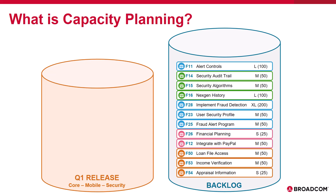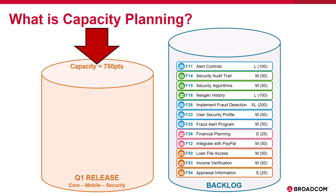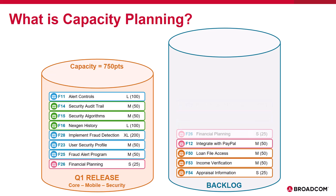Once you have the capacity of your teams and preliminary estimates in place, it's pretty simple math to understand how much of this will fit into this. You can start moving in features and assigning them to teams to build out your preliminary plan. And as planning continues, teams will drill into these features, start refining those preliminary estimates, and figure out exactly how the work will be assigned and allocated.